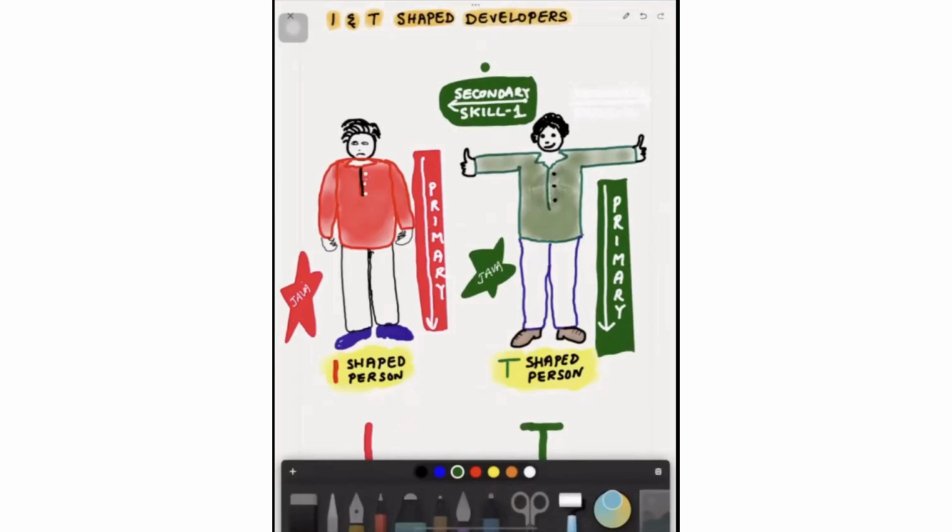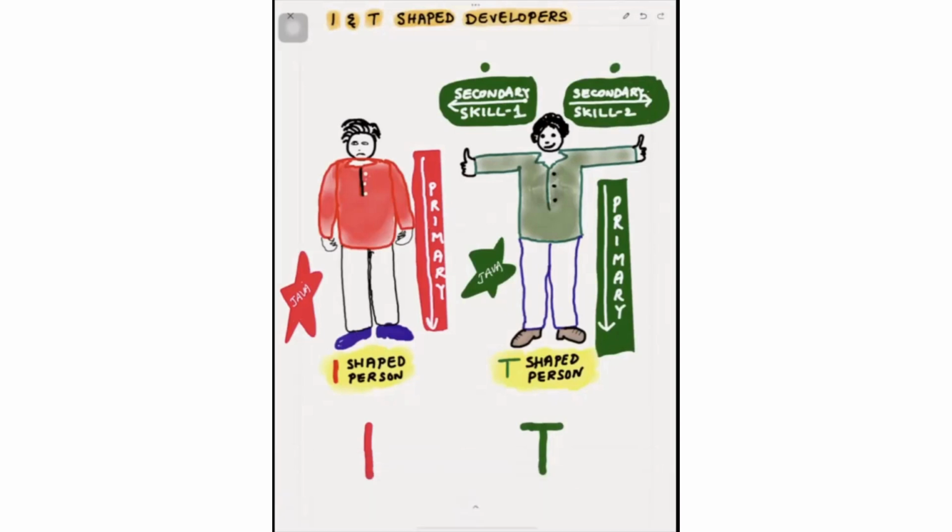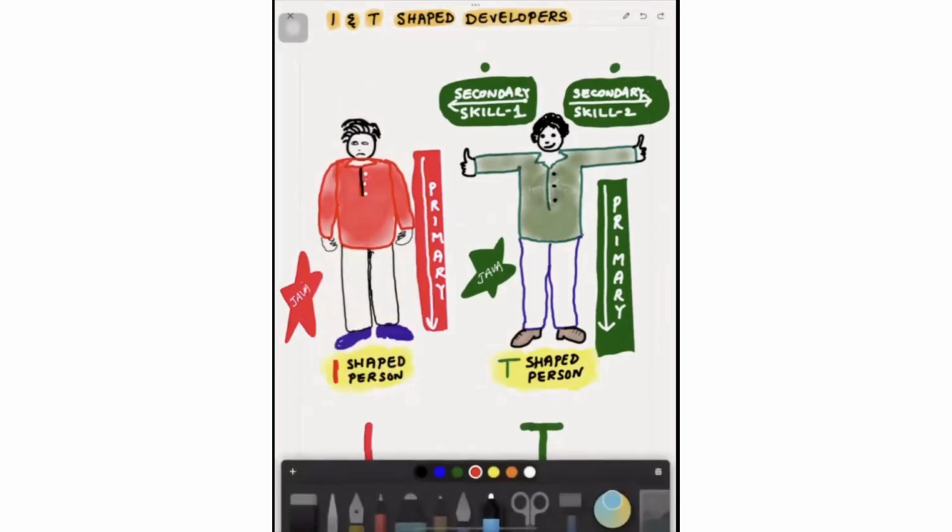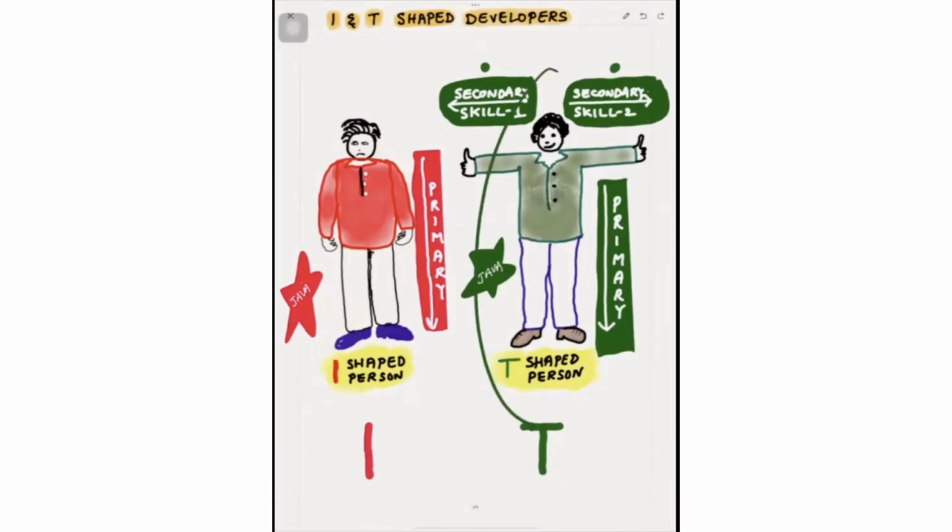Or maybe contributing to the database programming. He may not be a star in the database, but he can contribute at least minimum database objects like triggers, stored procedures, or maybe tables, something like that. They can contribute, right? So the concept here is, instead of creating specialists, we are trying to create generalized specialists. That is the concept of T-shaped skills.